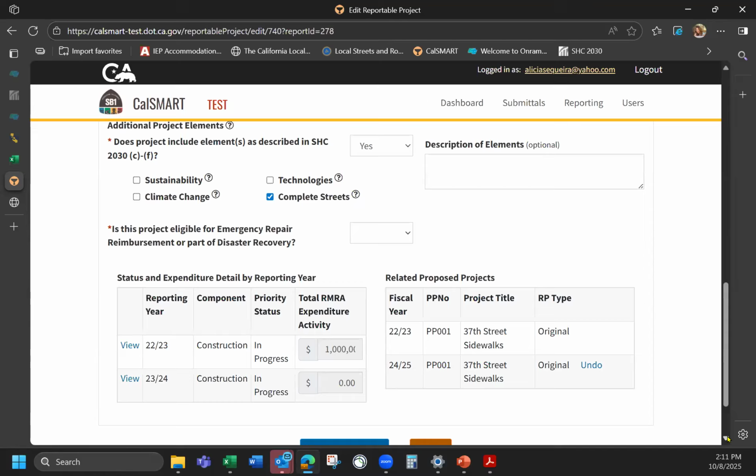And so a lot of times what we do see our jurisdictions doing is, let's say, up to 75% of an overall project cost is going to be covered by reimbursement by the federal or the state for emergency relief or disaster recovery. Okay. So that means 25% of your funds aren't going to be reimbursed.